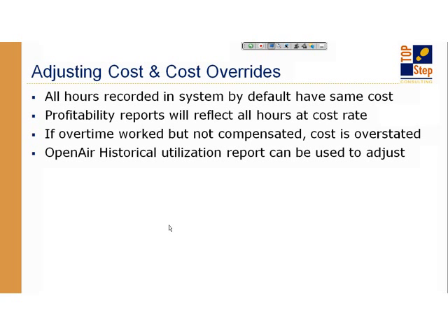So usually you see two theories in the tracking of this, and I see the reasons for both, but it really depends on your methodology and your financial policies. So one is every hour should contribute to cost, which then impacts profitability. So in general, the project profitability should accurately reflect the fact that I did all of these hours against the budget of hours, and therefore my profit is X. Okay, I budgeted 10 hours, I worked 12, I lost money, for example.